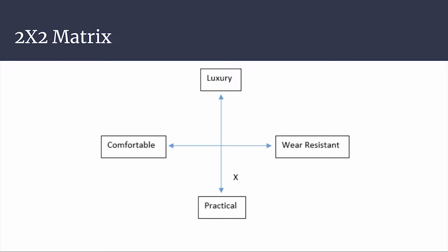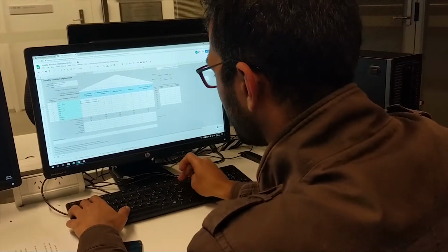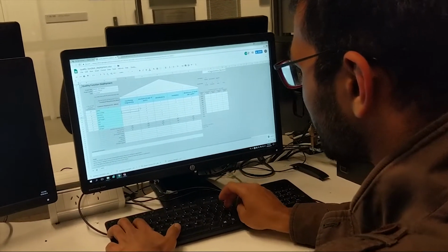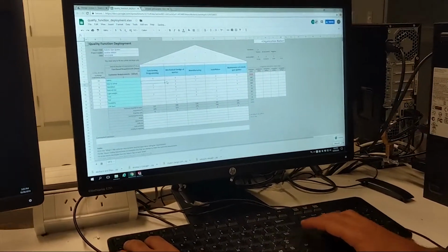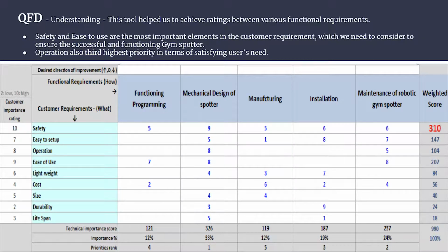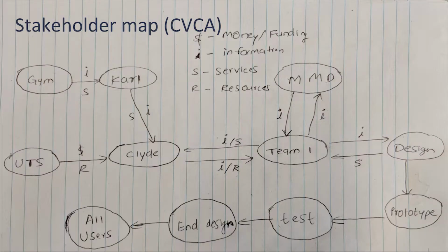To gain further clear understanding of the project requirements, the team used the QFD, Quality Function Deployment, tool. The QFD highlighted all the important client requirements and the required engineering tools and elements to satisfy the project elements. That provided the team with insights to evaluate and prioritize these requirements according to their importance to the project. As a result, it was found that the most important element is safety. The team created a full tree diagram understanding tool to seek the best design and engineering tools that can be used to fulfill the design requirements and goals.